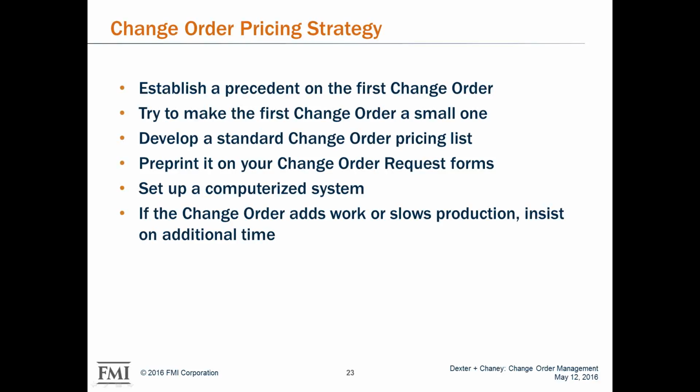Also, depending on what kind of work you do, you might be able to have some standard pricing. If you can develop any sort of standard pricing, that's beneficial. You can present that in pre-construction meetings with the client and say, we're still going through all the plans and the documents, and we're going to have RFIs out to try to clarify some of this. But I just want to give you a heads up, here's how we did it. If things have to change, here's what we charge for certain items. They can sign off on it. They can agree to that. There's no surprises if any of those things happen.